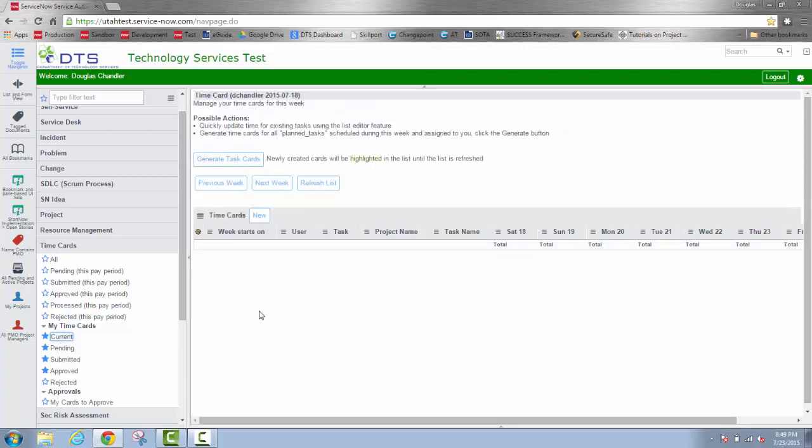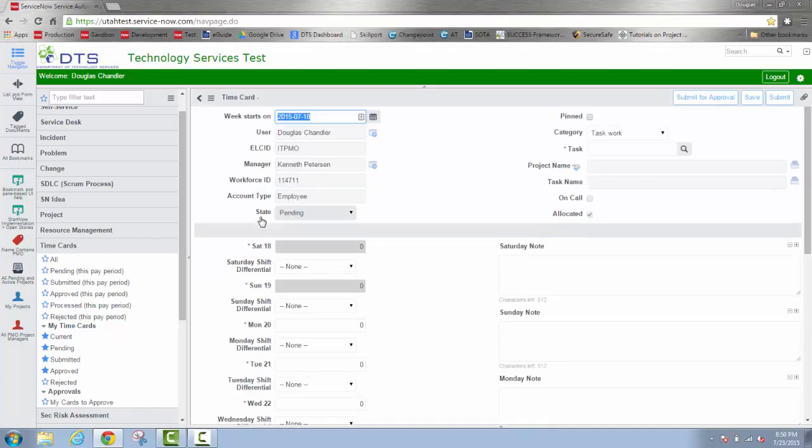There are a couple of different ways we can generate our time card. We'll demonstrate both ways to do so. First, we'll simply create a new time card. Even though I'm creating a time card, I am not creating a new task. A time card can only be created from existing tasks that I have authorization to put time against.